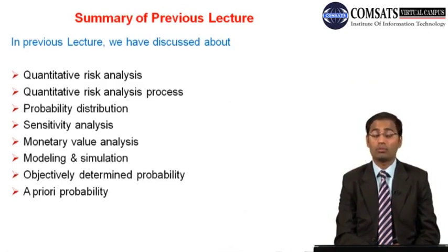And as far as probability distributions are concerned, what are these distributions, and how can they help us in simulation and deciding about our probabilistic values. And then sensitivity analysis was discussed: by fixing all other variables and changing one variable and observing the result on this one variable is called sensitivity analysis. So if you want to have the value of x, and x is dependent on y and z, and y and z are independent variables and x is the dependent variable, so if we fix z at one base value and then change the value of y within the limit which we specified earlier, this analysis is called sensitivity analysis.